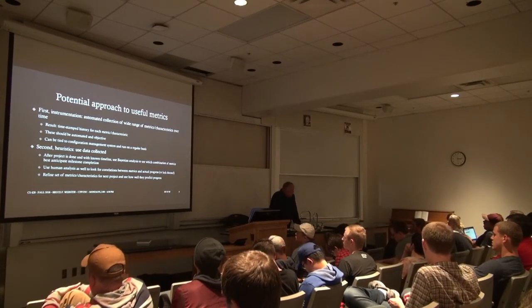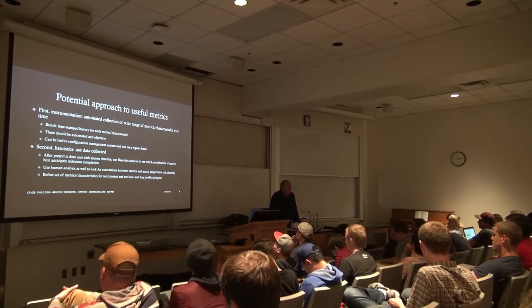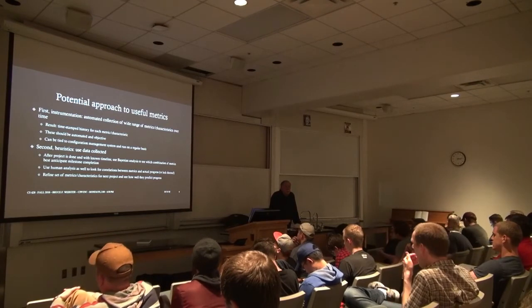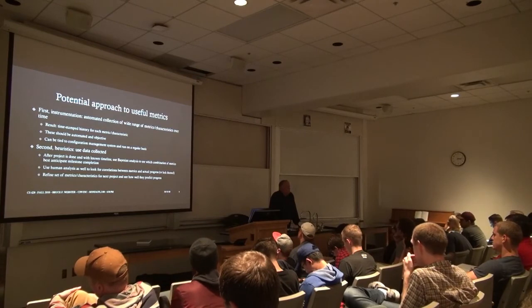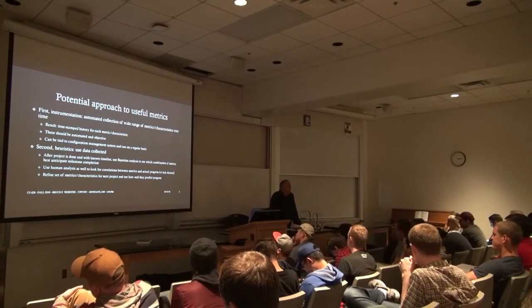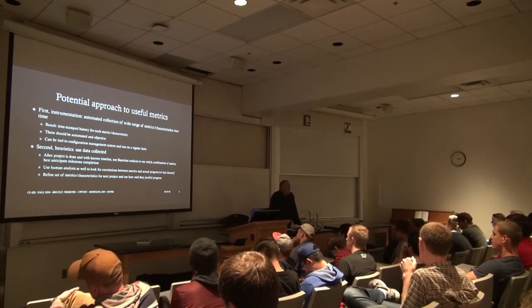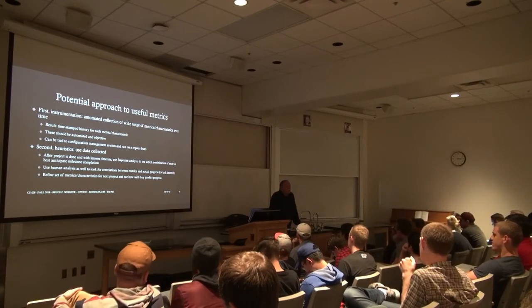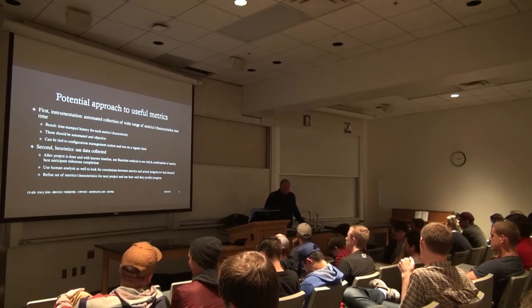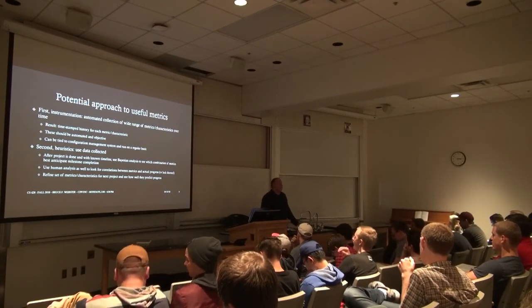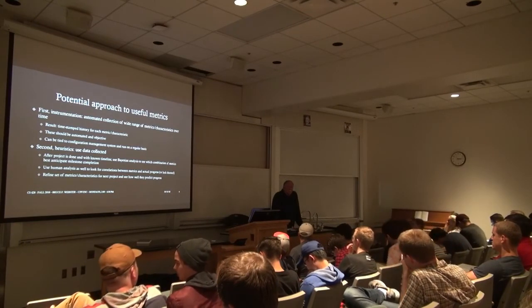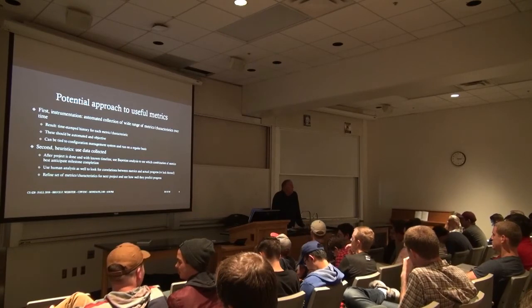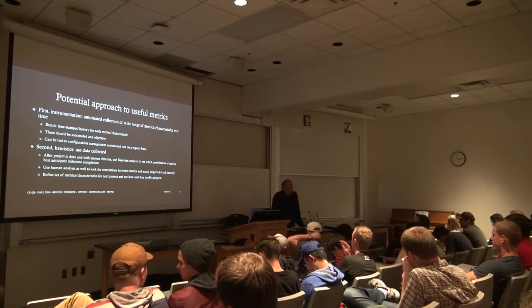But you're going to be running into metrics, and some of them are going to be as stupid as lines of code. How many lines of code did each programmer write this week? Which is meaningless in a number of senses, starting with the fact that if you're doing any refactoring, you're going to be reducing the number of lines of code. But it's not an effective measure for project completion.